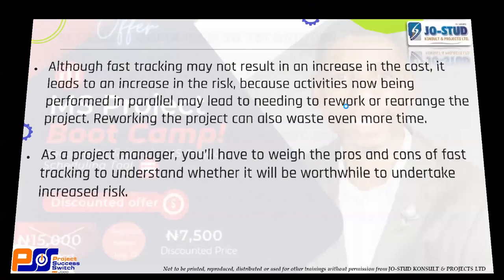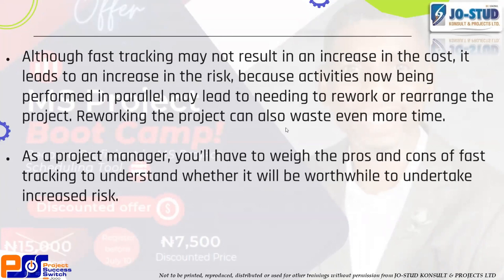We've not gone so far. Now, although fast tracking may not result in an increase in cost, it will lead to an increase in risk. For example, what I've just done with this training now, they may start the training and the risk may be